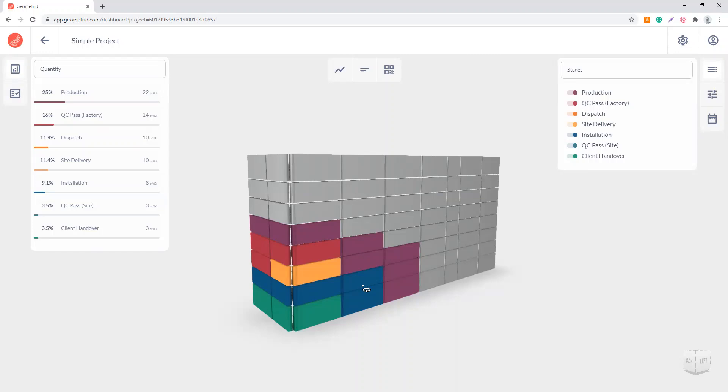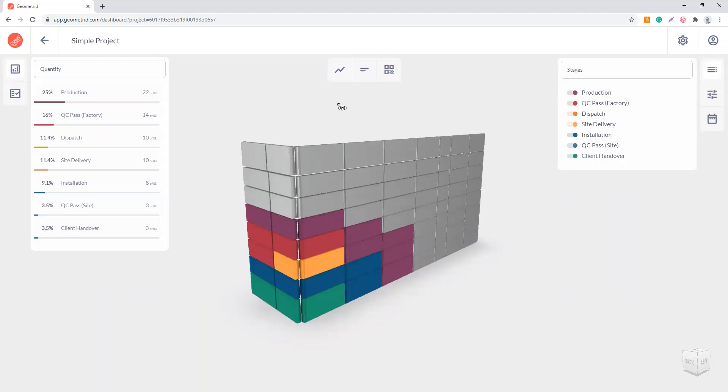On the left side for each of these stages, you would see a calculated progress. You get a total number of elements in the model as well as the number of elements completed in that stage, and there's a calculation of the progress for each of the stages.